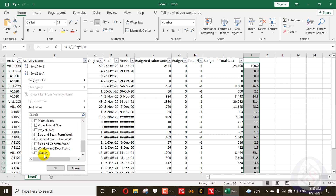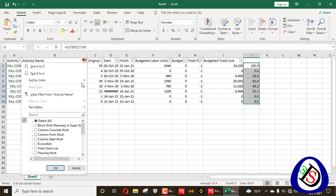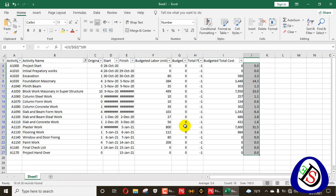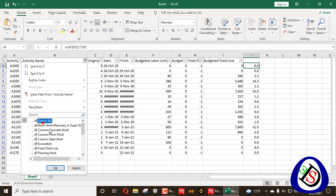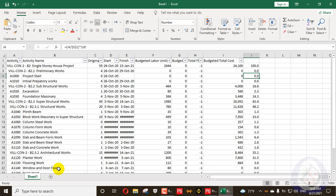By clicking blanks, I can show only WBS rows — these are WBS weightages. The others are activity weightages. If I want to show my activity weightages, I'll remove the blank filter. I have calculated my weightages from my total cost. If I want to calculate labor unit weightages, I will apply the same formula. If you don't have available total units, you can get them from your view, calculate the weightage of each activity, and divide the total cost by each activity.